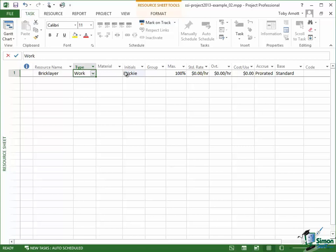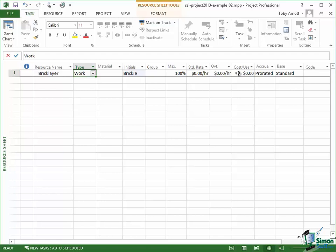And if you look over to those cost fields that I mentioned just now, you can see that we have a standard rate, so a certain number of dollars per hour that we pay a bricklayer, and then we have an overtime rate, a certain number of dollars per hour that we pay on overtime, extra time rate. We also have another cost figure which is cost per use which is usually an additional cost. We may have to pay one off to use this resource.